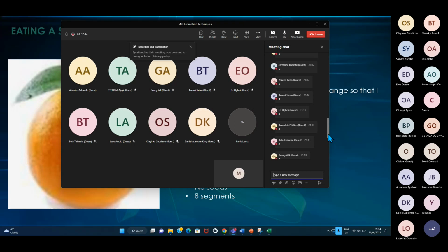If it's a complex one and everybody's going for a higher number, but there are more 3s than even 8s, then you can say, okay, let's come to the mid level and go to maybe 5 or something like that. Maybe somebody chose 13, another person chose 21. You can say, okay, what do we need to look at here? Why did you choose that? If it's too high, why do you say that? Maybe it's the developer that is choosing 21. You can say, okay, based on your experience, what do we need to take into consideration?